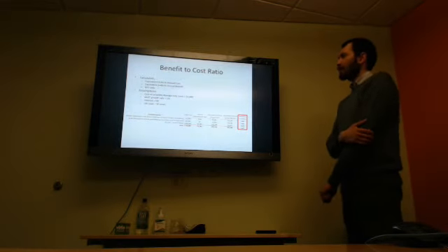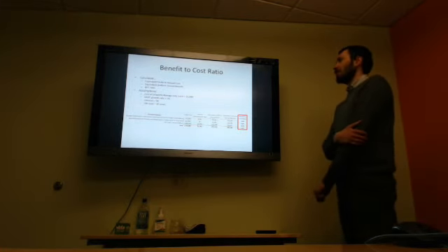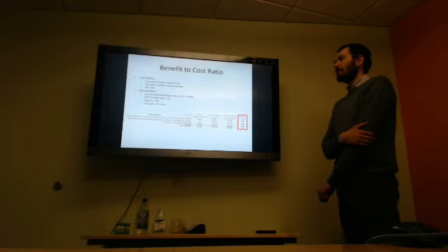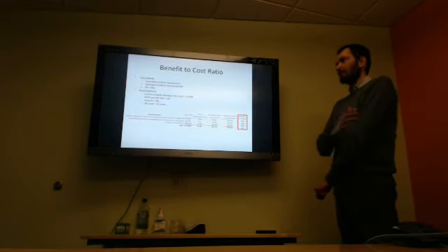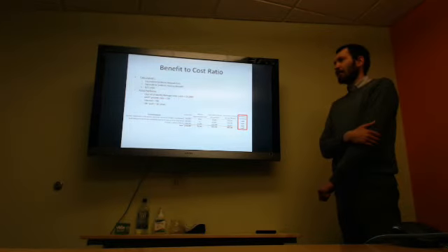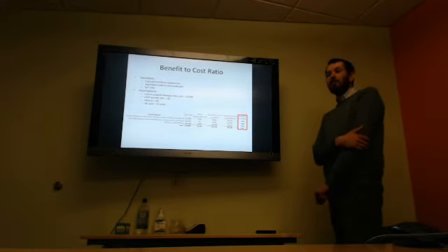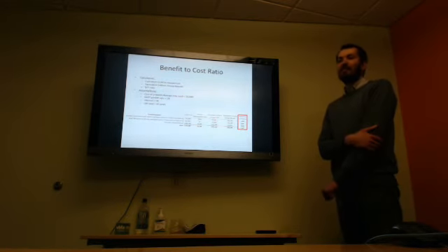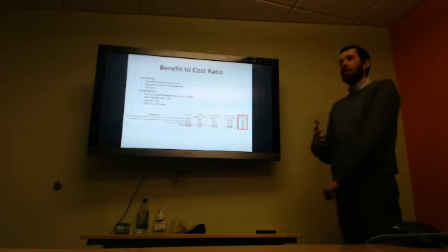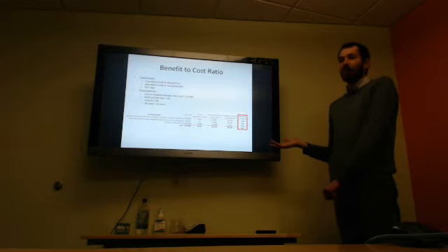And yes. So cost of PDO crashes, about 5,000. AADT growth rate, this is the east. There's not a ton of growth going on. Everything's pretty built out, but just to be conservative, I used 1%. And then an interest rate of 5%. And then assume the lifespan of all these improvements for about 15 years. They'll probably last longer in all honesty, but they'll probably need major renovations and a lot of expensive fixes by that point. So just for the sake of this project, I assumed 15 years. If anything, that's a conservatively low estimate.